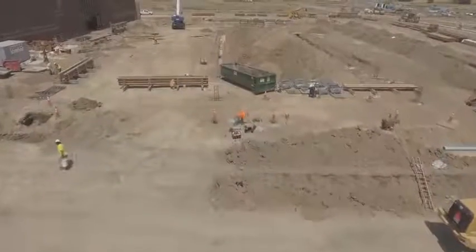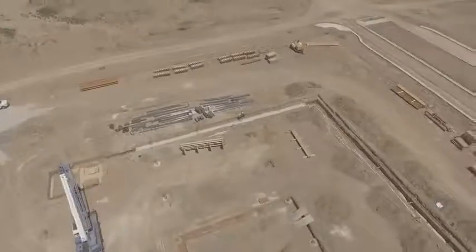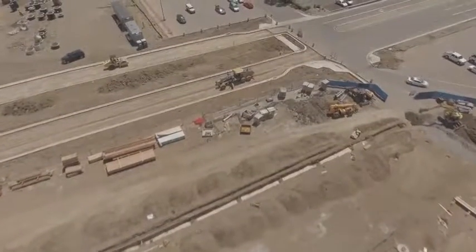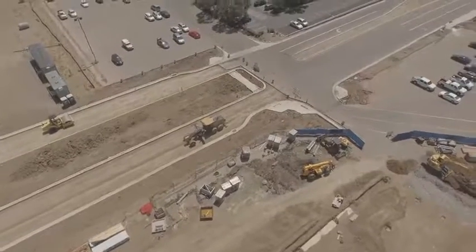One of the Contech Academy partners who helped us in the development of this course uses volumetrics regularly on road projects where they will keep track of aggregate or fill collected during excavation. They store it nearby and then use it to backfill in holes at the end of the project. By scanning and keeping track of the amount of aggregate that they have in particular locations, they're able to better plan how much should be taken from different areas or how much needs to be ordered in supplement.